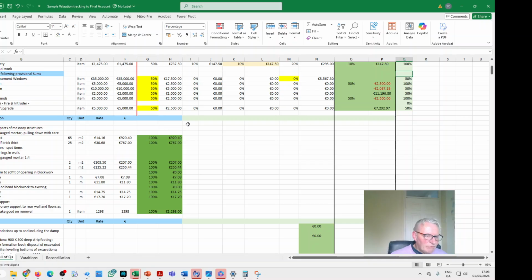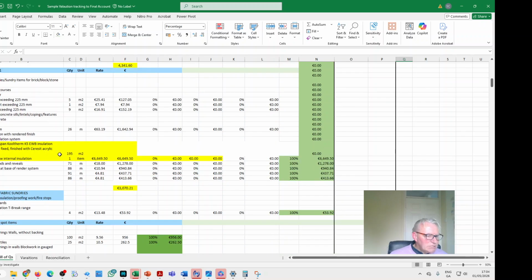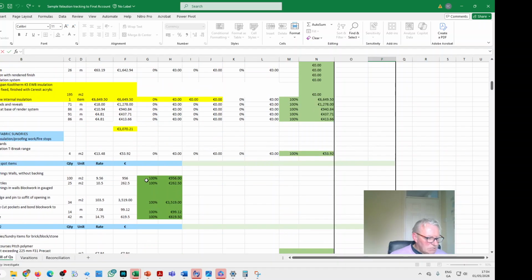So you can see in the first month all of the demolition is done. Then you can see there was very little foundations done here. There was none actually, that was called off. Then you can start to see masonry work and adjustments being done a little bit further down the road. And what's really important is these. We have rates per activity, and these rates end up being the basis for variations and examination and verification of variations. I'll talk to you about variations in a while.